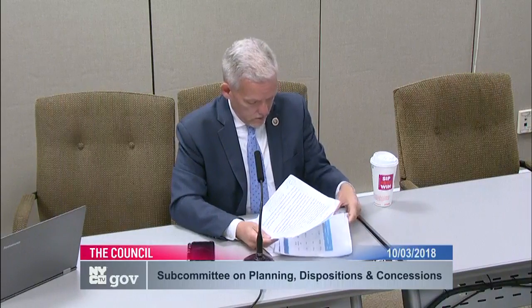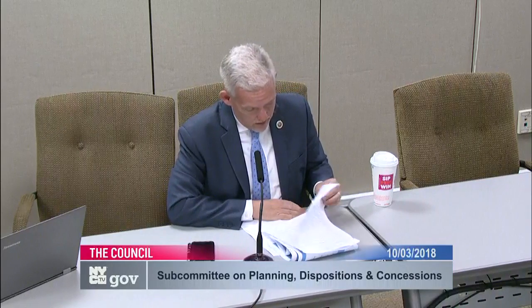Maybe, John, you could talk a little bit about timing here, because that school cannot be built fast enough. And we are hopeful that this action will help expedite your process. But how are we doing there? Our expectation is to close at the end of this year, and we will have a building permit at that point, and we will begin construction immediately. And it's my understanding that the school is lined up to begin construction at the same time, beginning of next year. Okay.